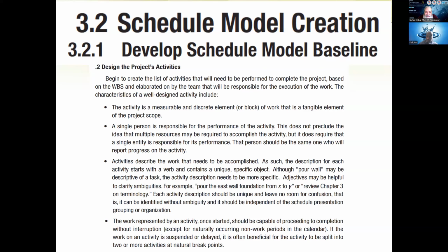Second important thing is a single person is responsible for the performance of the activity. Now, it is not always the project manager who is responsible for everything. Every activity must be assigned a single person who will lead the team which will do it, right? You understand? There must be an owner for every activity. Usually in our projects, the person who is supervising the team is normally considered to be that person.